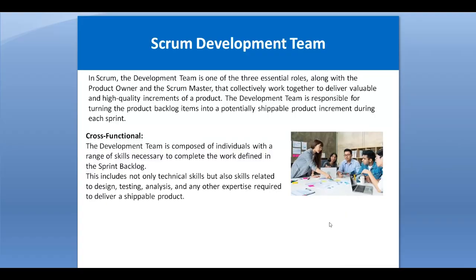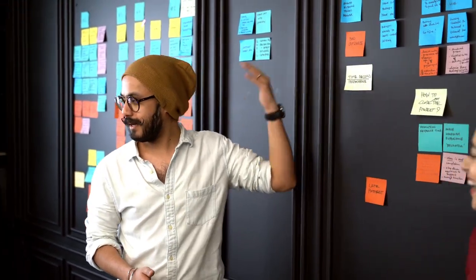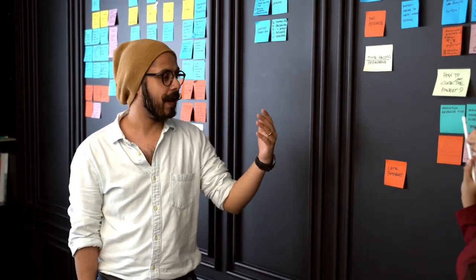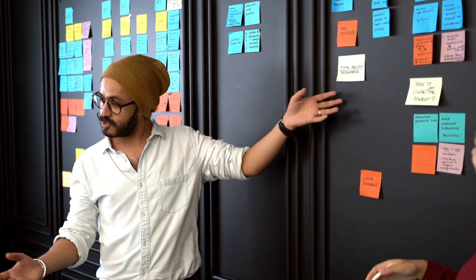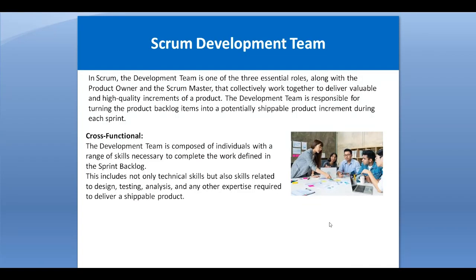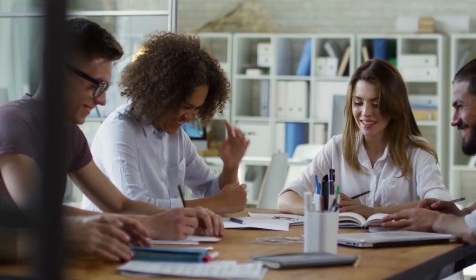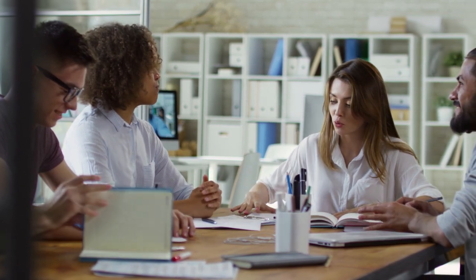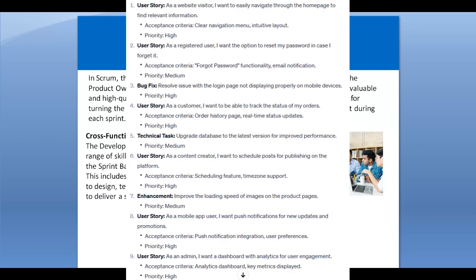A sprint is a 3 to 4 week time period in which the team commits that, for example, if there are 40 tasks, we will take these 10 tasks from the product backlog, and we will deliver them to the customer. So this is the development team, which is developing, planning, testing, and delivering to the customer as well. The product backlog is a set of features or requirements for the product, and product increment means that after completing each sprint, the delivery becomes the product increment.